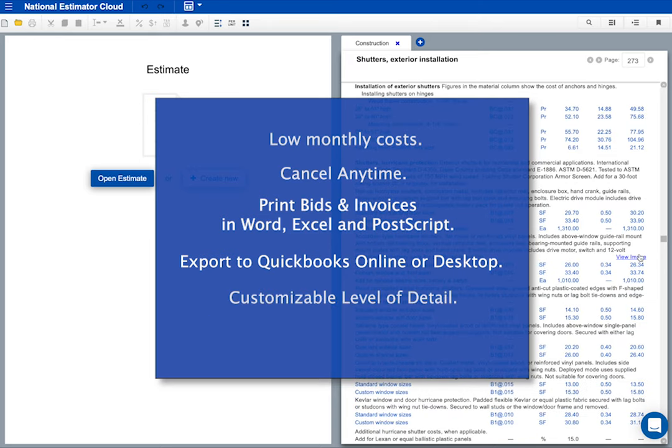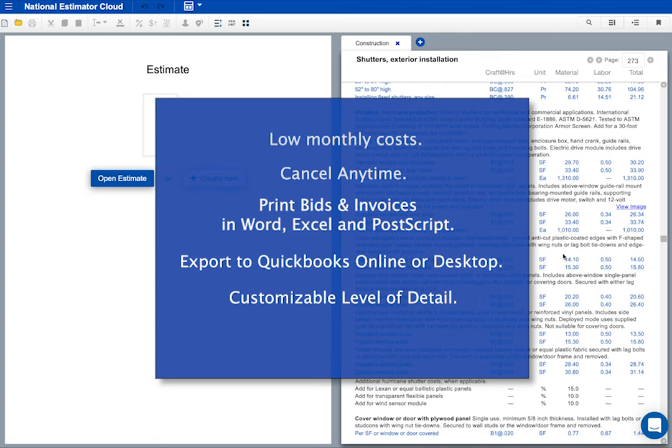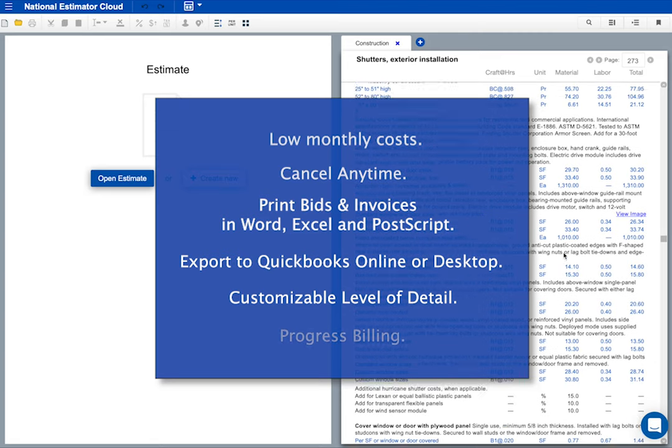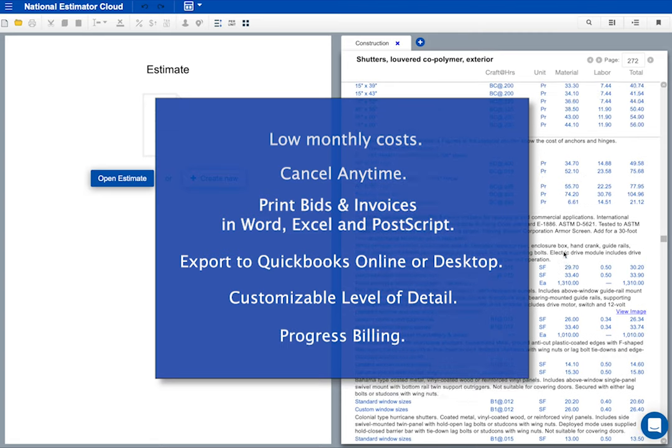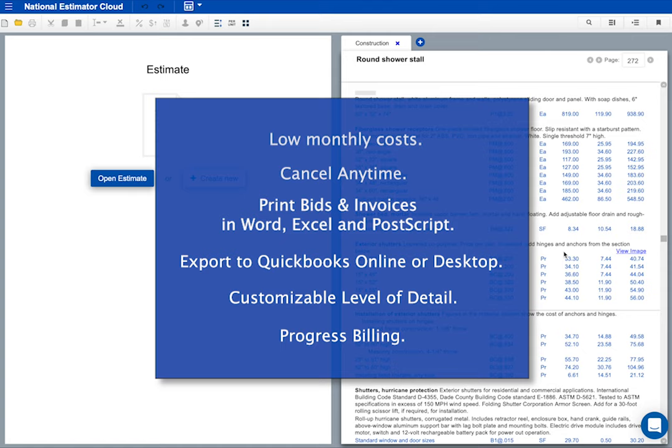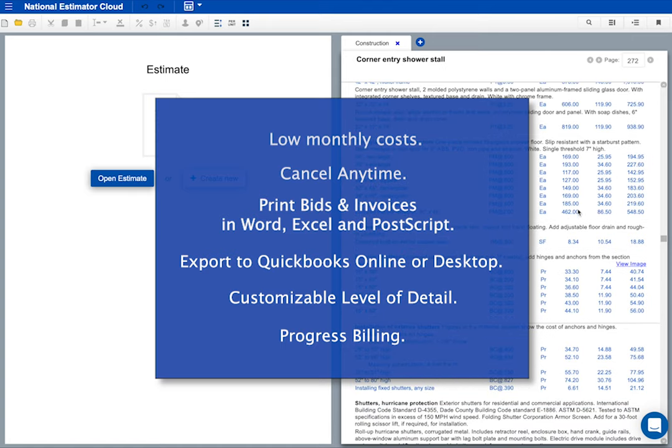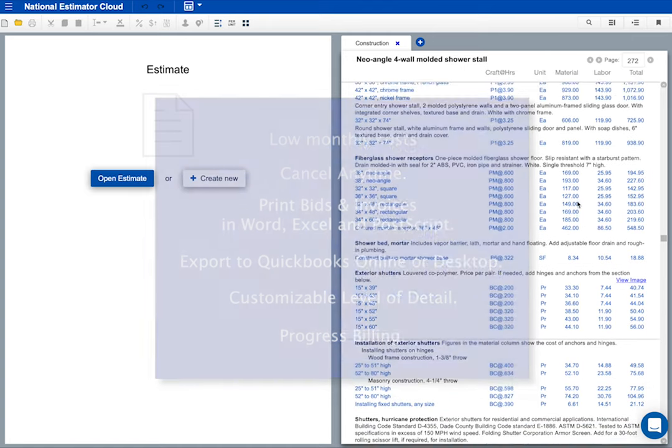My bids and invoices can show as much or as little detail as I want. National Estimator does progress invoices, so I can send a bill for each part of the job as work gets done. I'll show you how it works. We've got a concrete driveway job coming up. I'll make a little bid for this job.